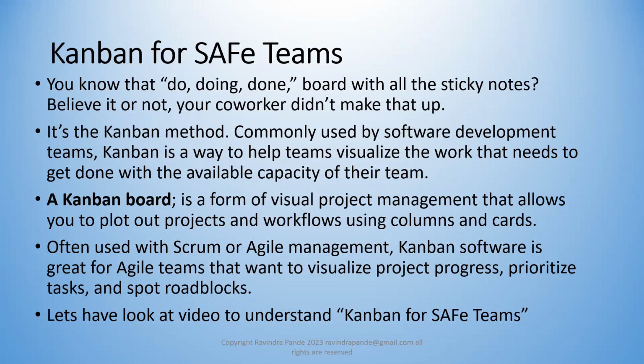Let me show you a video where the person basically tries to showcase the to do, doing, done type of 3 swim lanes addressed in terms of the task at hand as of today. So we use this Kanban board in our Agile Scrum daily meeting, which is a kind of 15-minute meeting where we normally take the product backlog or the sprint backlog on the left hand side. We have a middle swim lane: what are we going to do today?